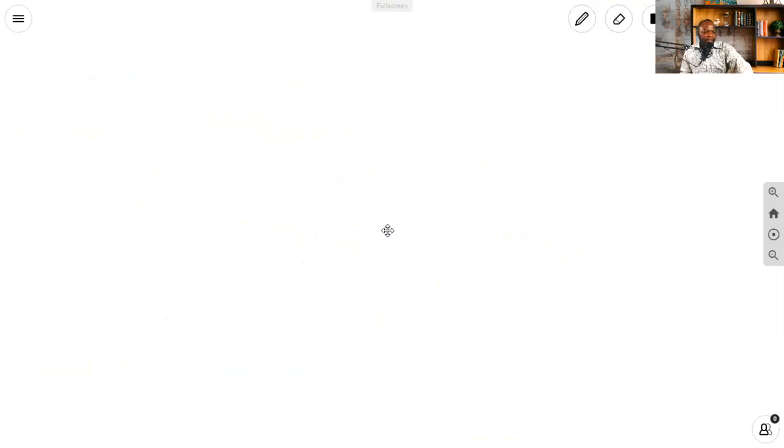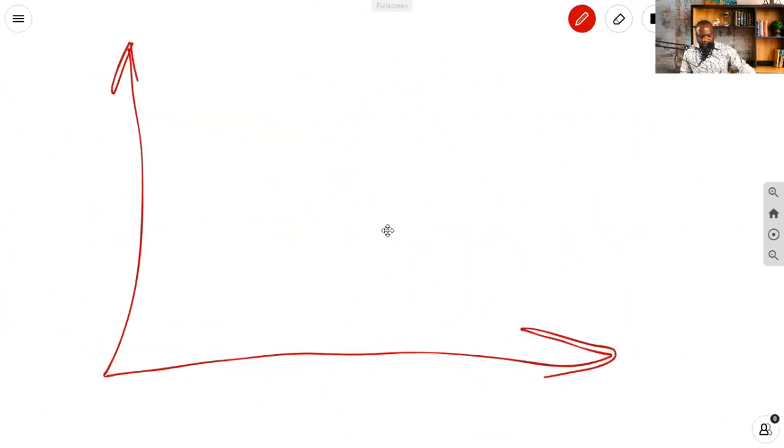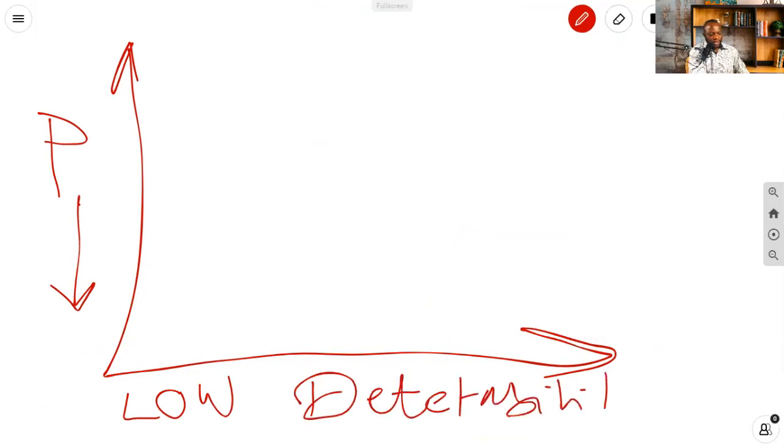If you go to page 426, you'll see the hierarchical charts. And this is talking more about bubble charts. So you see proximity is low, going that way. Incorrectly, incorrectly, they have put low here for detectability. And that should not be the case. Detectability, we don't want it to be low in this zone where we say small bubbles in this area are acceptable.